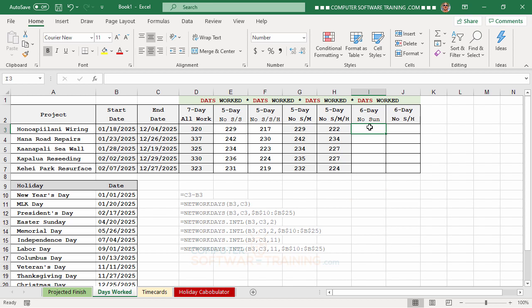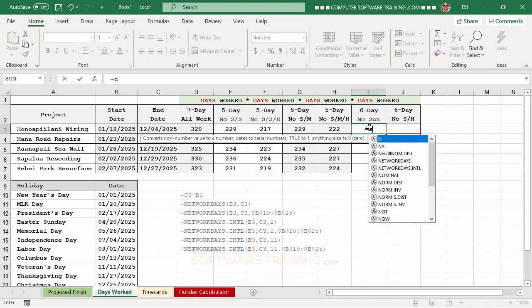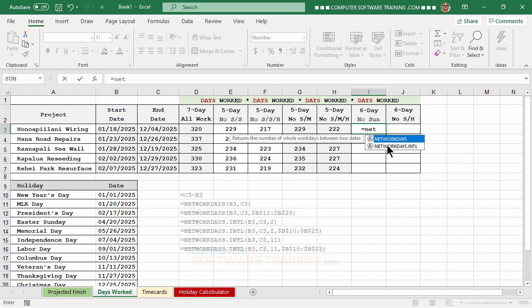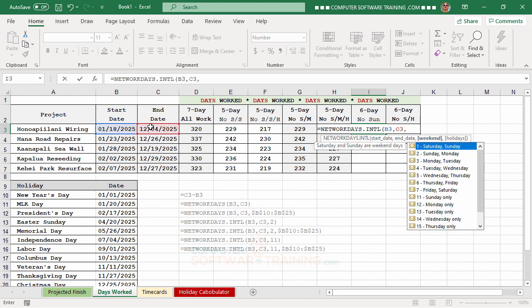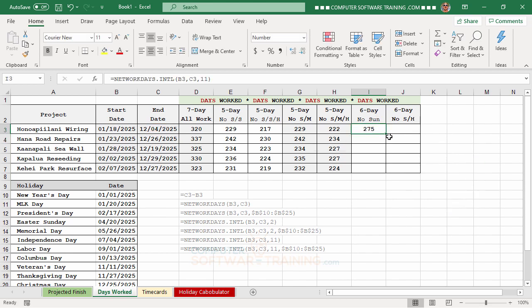The next column is for a Monday-through-Saturday schedule where only Sundays are off. We use NETWORKDAYS.INTL: equal, NETWORKDAYS.INTL, start date, comma, end date, comma, and number 11 for Sunday-only. Press Enter and copy down.